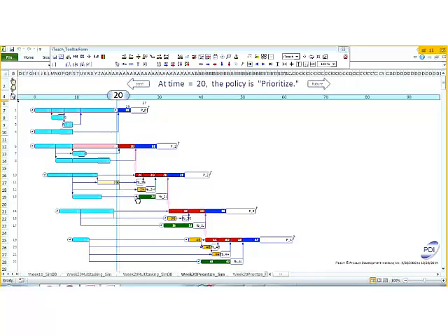Now when we engage the drum later, we also want to let the feeding work move later and integrate in a feeding buffer of time before it's needed. So you see our feeding work integrating here with feeding buffers into our critical chain, and then I'm going to put a project buffer on the end before I make the commitment and nail the commitment down. Yes, inter-project critical chain. So this is the multi-project critical chain, or the chain of work for the drum resource.